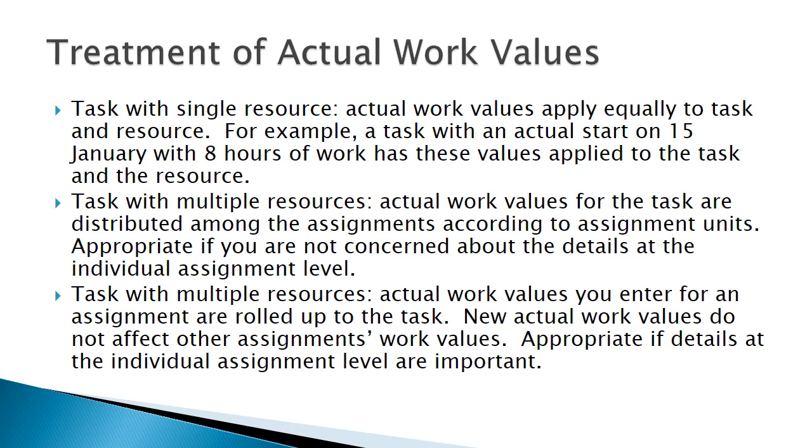In the event there is a single resource, actual work values entered are always applied equally to the task and the resource. If there are multiple resources and you enter the actual work against the task, the actual work values are distributed among the assignments. This is a level of detail that is appropriate if you are not concerned about the details of an individual resource's contribution to the work.